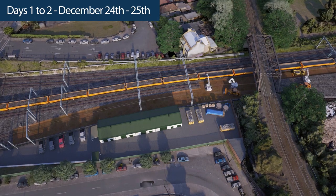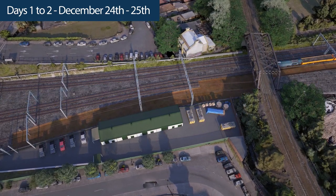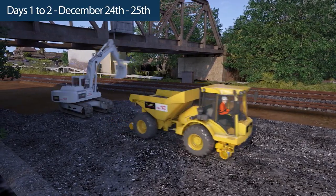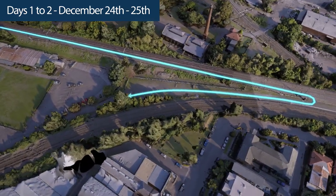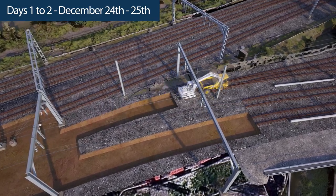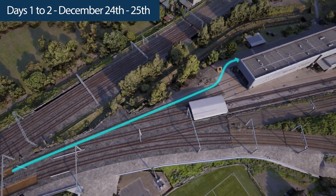Trains will leave at the end of possession full of spoil. Excavations and capping installation along the Bankstown lines will be carried out by high-rail dump trucks to Fraser Park, and excavated capping material from the throat of the XPT being transported to and from the XPT compound.